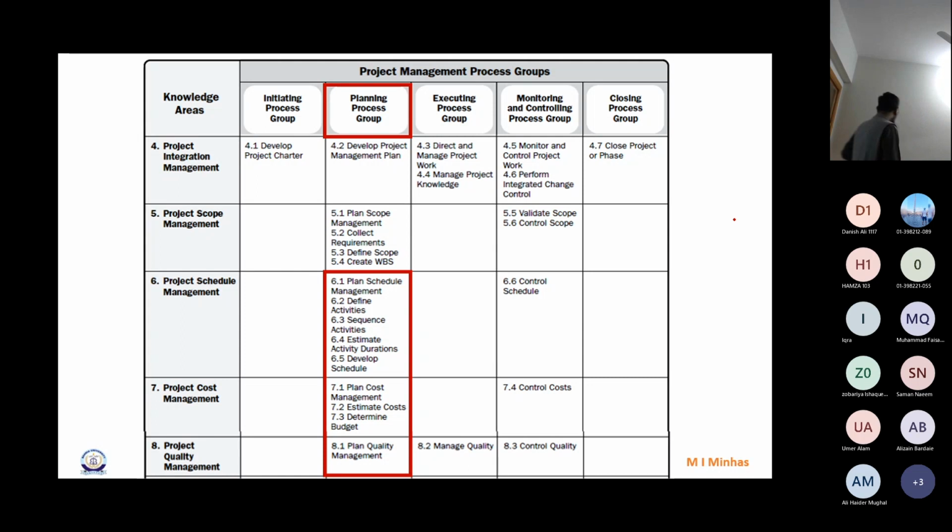Right? Okay. So now we have received it. The only thing is we need to check it. Before I call the customer, I will check it myself. But how to check that? How much gas is accepted? What finish, or how to test the finish of this? Correct? So all of this is defined here in the plan, how things would be tested, what is the acceptable limit, we call them control limits. So everything is defined there.